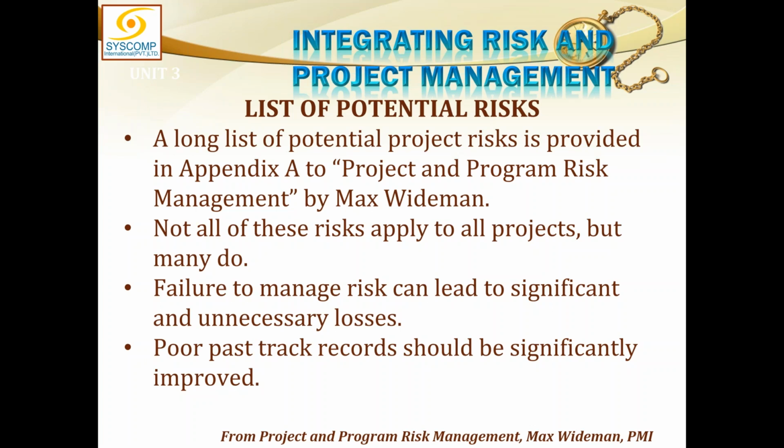Not all of these risks apply to your project, but many will. So it is always helpful to take help from such a long list of potential risks, or checklist, or whatever you want to call it. There's another name, prompt list. A prompt list is like a to-do list in which you have noted down certain points, and you look at those points as prompts that I must consider risk in this area.